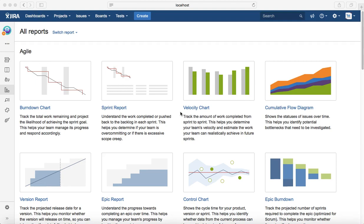Your velocity chart will track all that progress sprint by sprint. You can go back and see how many points were committed and how many were actually achieved. This gives you visibility to estimate the work based on the team's velocity or what the team is actually able to achieve.